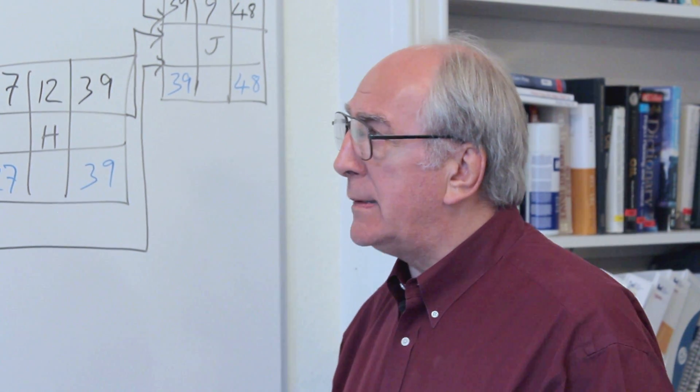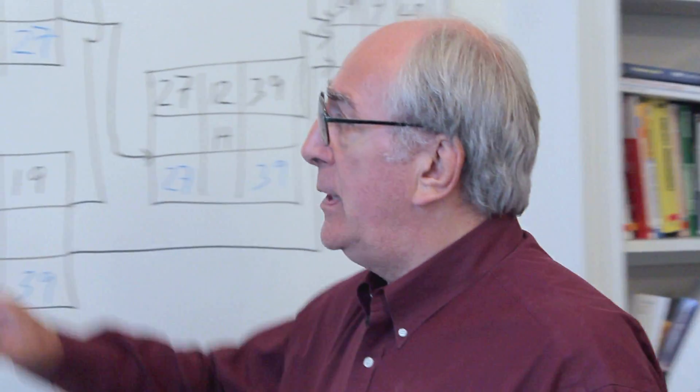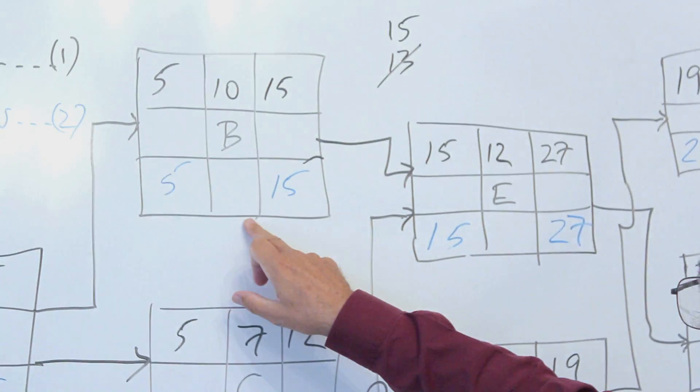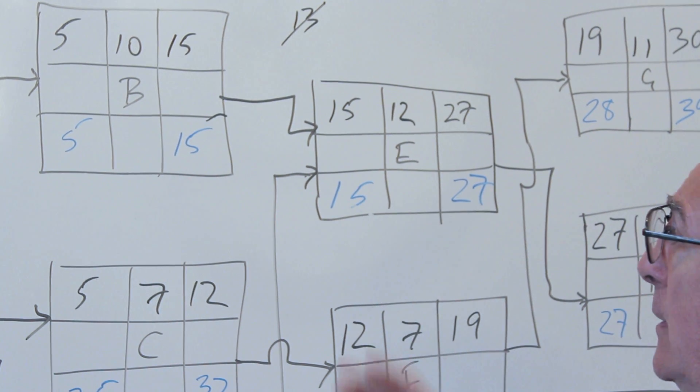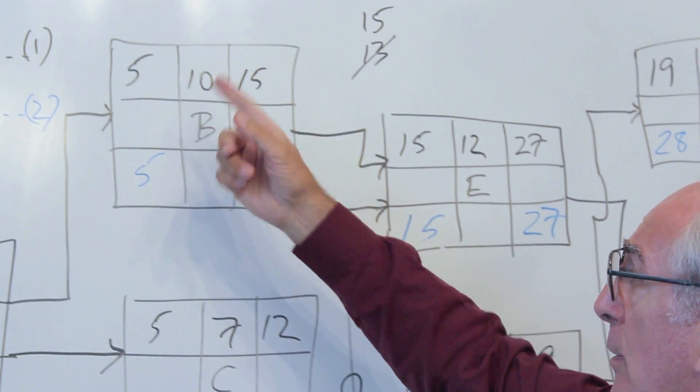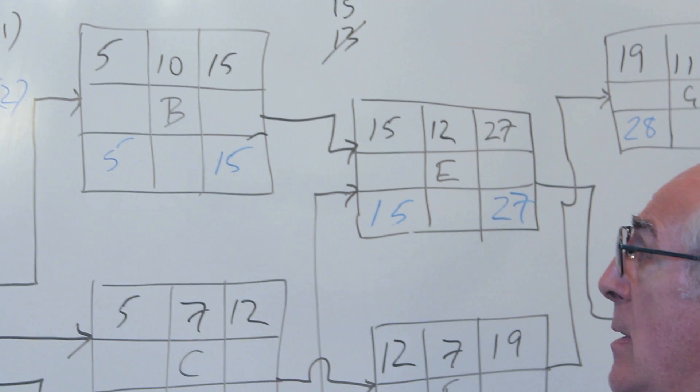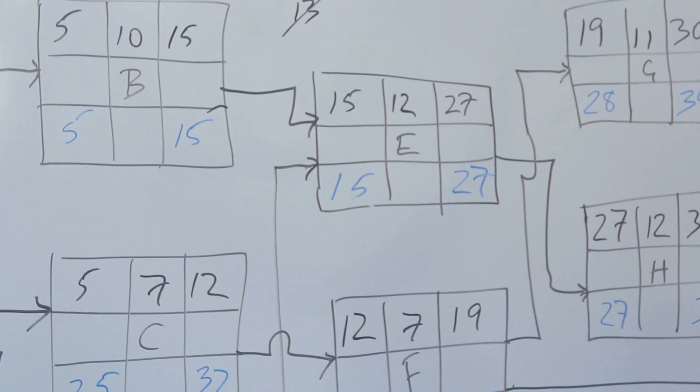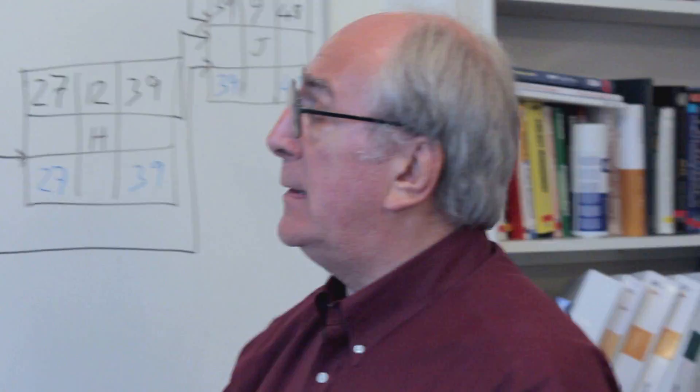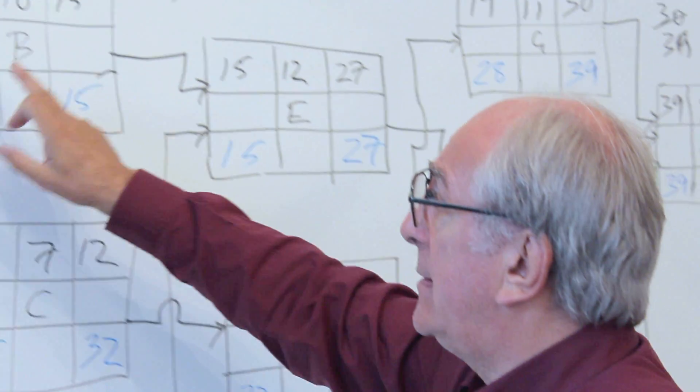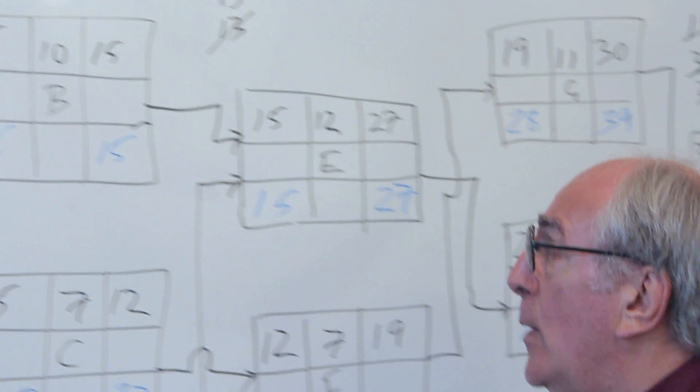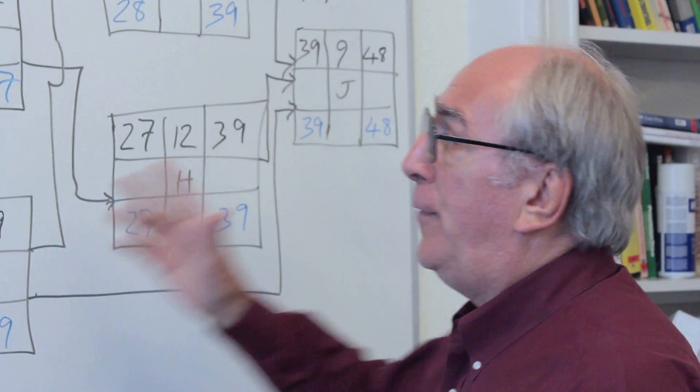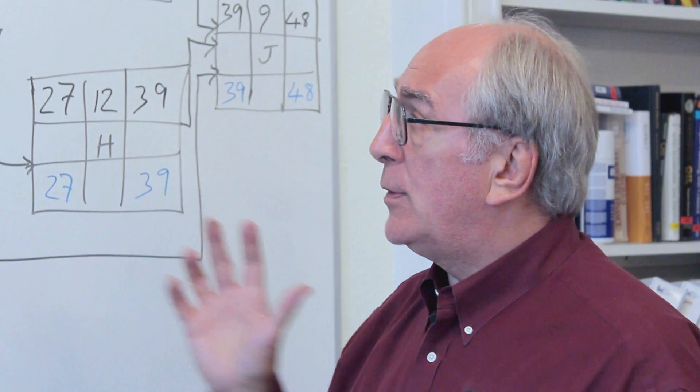That has a certain quality which activity B doesn't have, because the early finish for B of 15 and the early start of 5 for B are exactly the same as the late start and the late finish. That means if in any way this starts later than that early start, that will affect the end date of the project.